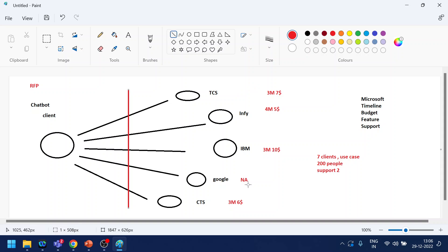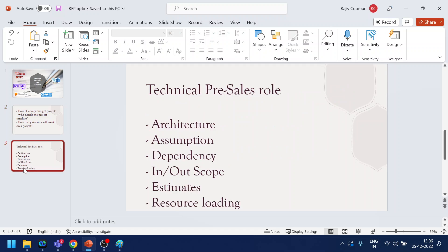If that concept is clear, from the technical pre-sales side, what I will try to explain is what are the architectures, what does the technical pre-sales guy do, being an architect of a particular technology. I will explain how we can create architecture, what are the assumptions we have to take, what are the dependencies we have to mention, in and out scope which basically goes under assumption and dependency, how to calculate the estimates, and how to define the resource loading, how much resource is required and when they will be added. There are various estimation processes like bottom-up estimations where we divide the whole project into small components and from there on add timeline and costing for each and do the whole sum calculation.